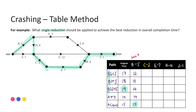Now looking at activity C — any path with C present, I subtract 2. No C in the first path, remains at 17. No C in the second path, stays at 18. There is a C in the third path, so 19 minus 2 brings it down to 17. No C in the fourth path, stays at 14. There is a C in the fifth path, so 15 minus 2 gives me 13. Looking for our largest value — 18 — so if I reduce C, comparing to the original critical path, I could save 1.